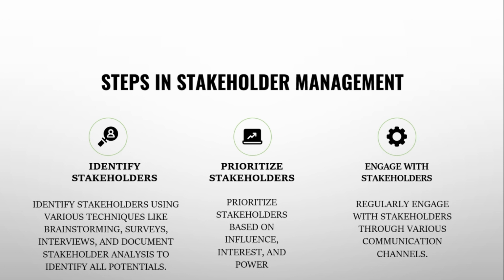It is important to place stakeholders where they belong because the level of communication, the level of conversations, the level of access, the level of mails in the context of communication will be determined by the level of their power and interest in the context of the power interest grid.